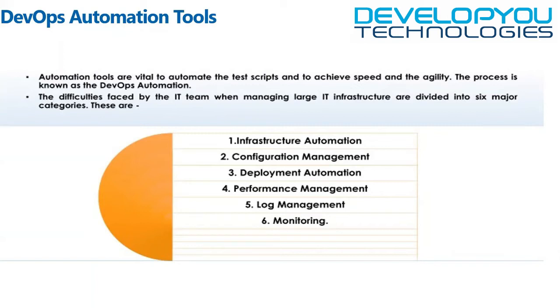How do I build 20 servers? It will take a lot of time, because I have to purchase hardware, install the OS, set up the software requirements for the application, and then deploy the application there. Each server will take minimum 1 to 3 days. If each takes 1 to 3 days, my deployment will take at least 2 to 3 weeks, bare minimum, once the infrastructure is ready.